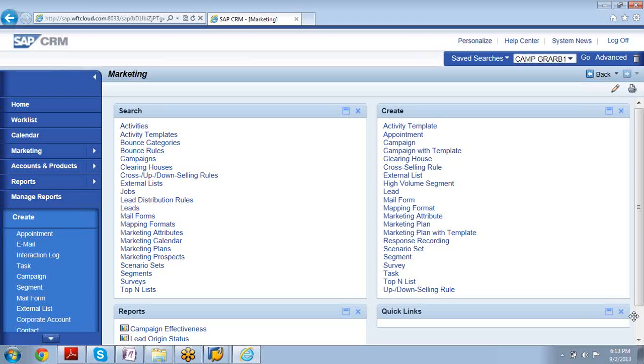So this is the analysis of the system. That means project preparation of any SAP implementation takes 20% time minimum. Blueprint takes around 25 to 30%, and realization takes 20%.